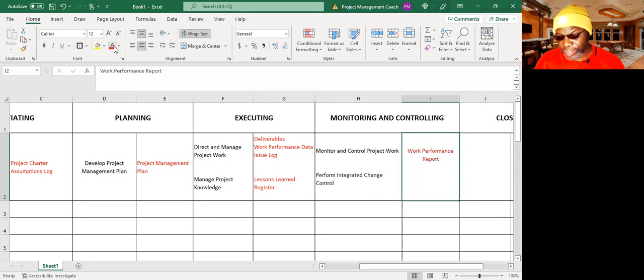Like there's a report I used to put together when I was at Honeywell. Every Tuesday or so, we would meet with management, and that report was an earned value report, pulling SPI, CPI, SV, CV, cumulative stuff, digging deep into programs and projects and down to work packages. So it's a rather complex report, but not every report needs to be that complex. There are other jobs I've done where the reports are so basic, it's just so easy. So it really depends, but PMI refers to them all as work performance report.